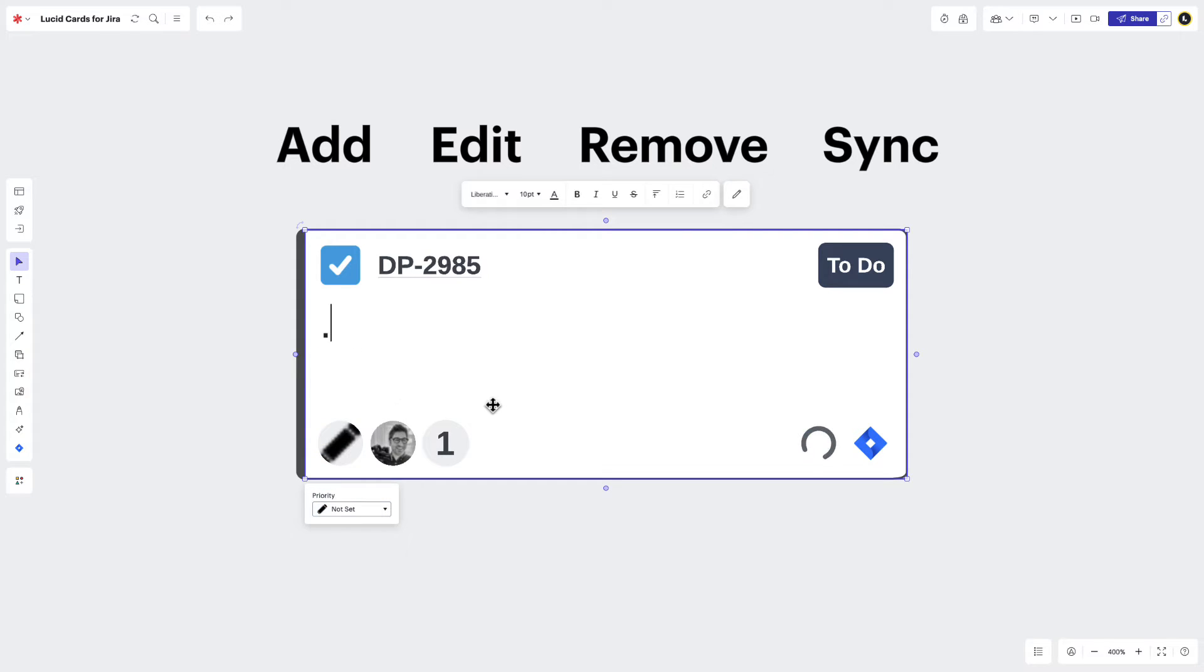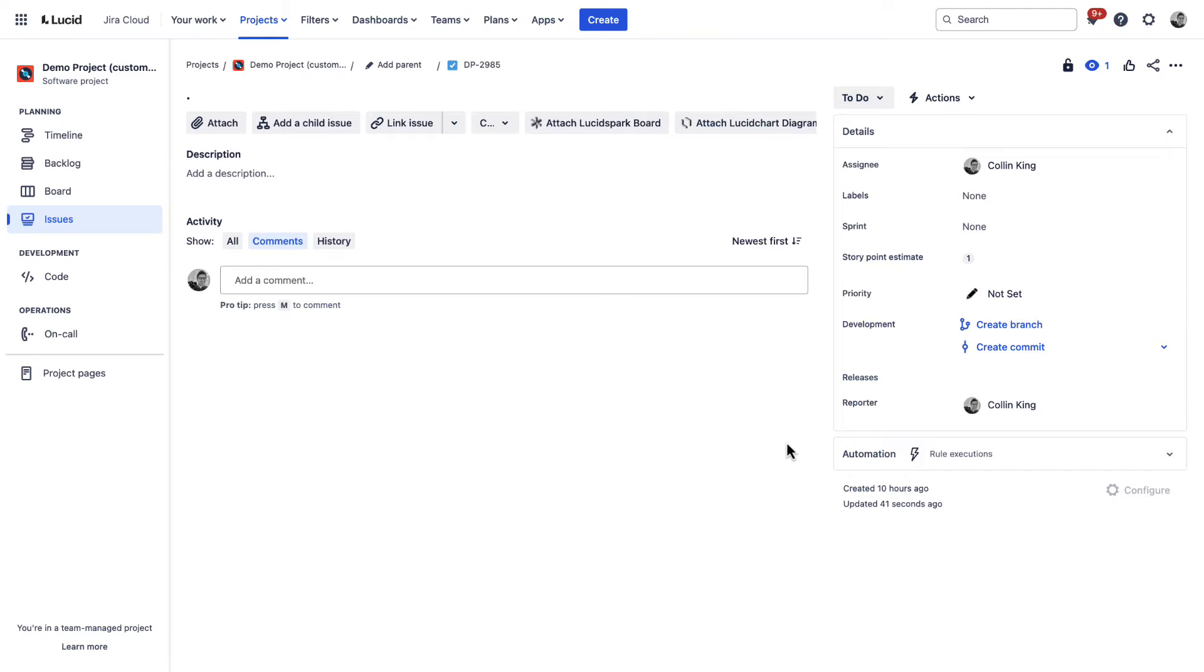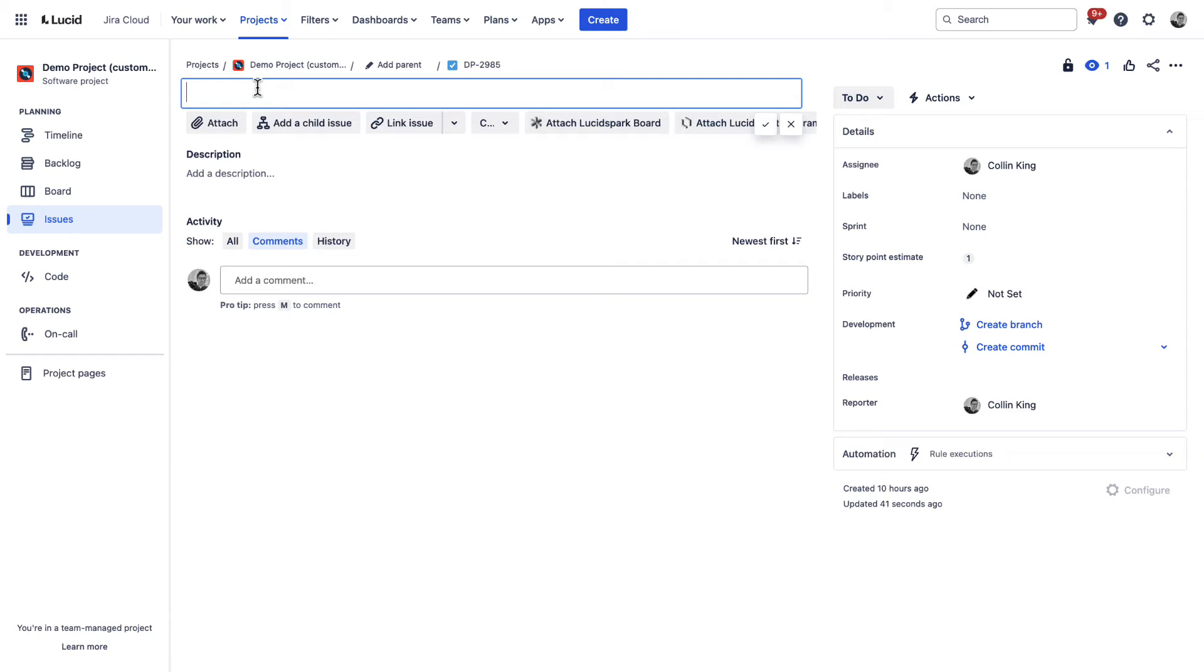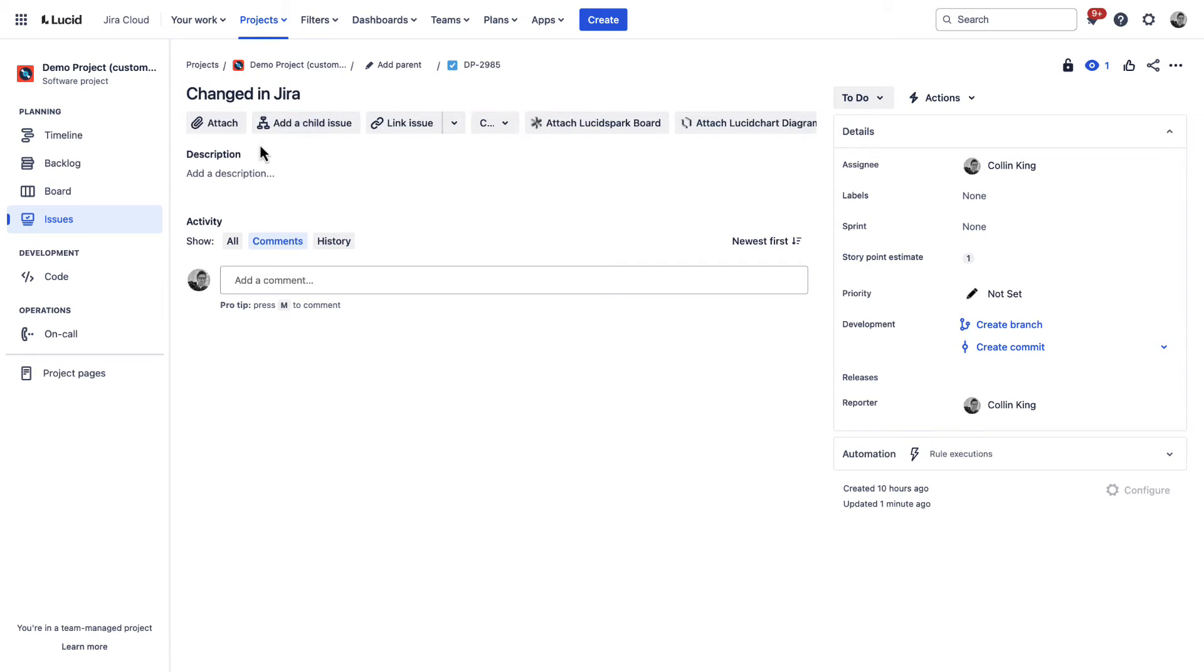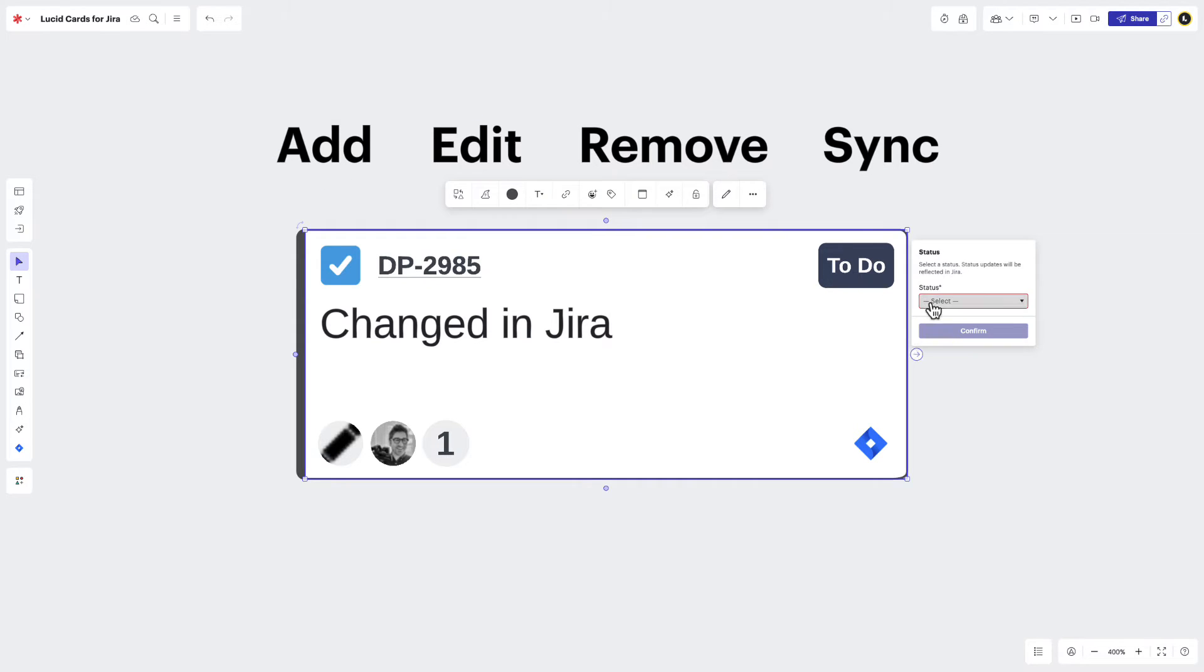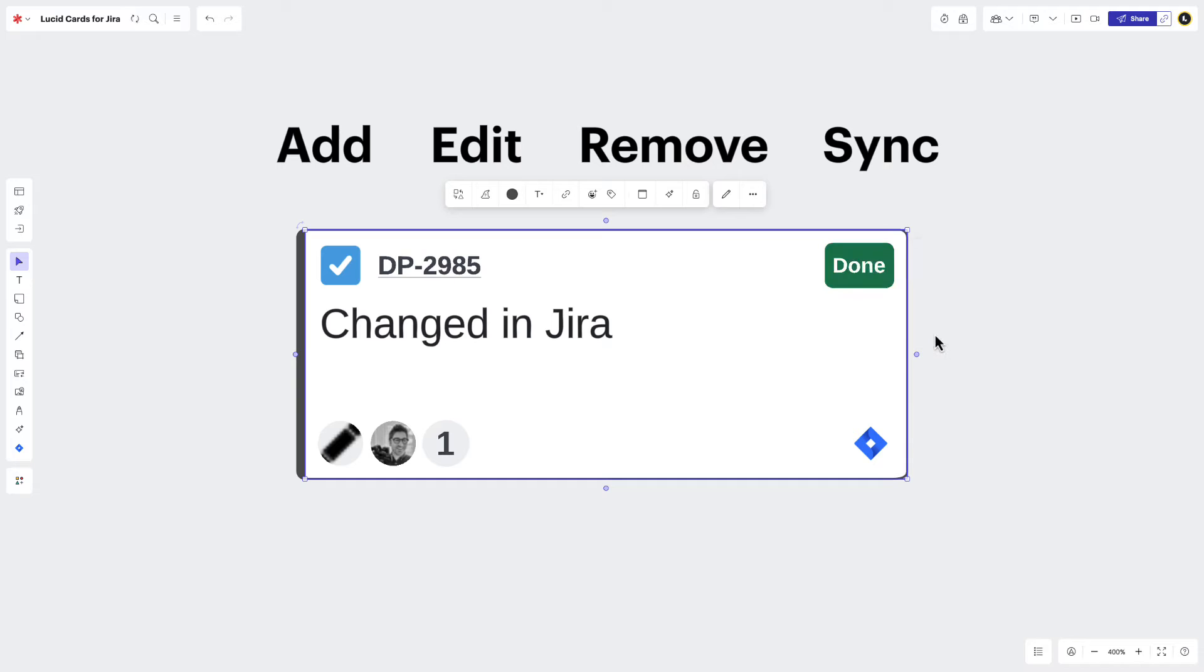And any time you make a change, you'll see a progress wheel appear on the front of your LucidCard. That's because LucidSpark and Jira bi-directionally sync with one another. So when you make a change in LucidSpark, you're also making that change in Jira. Or when you make a change in Jira, you're also making that change to the LucidCard and LucidSpark. It's a powerful feature that really transforms how you manage and keep your issues up to date.